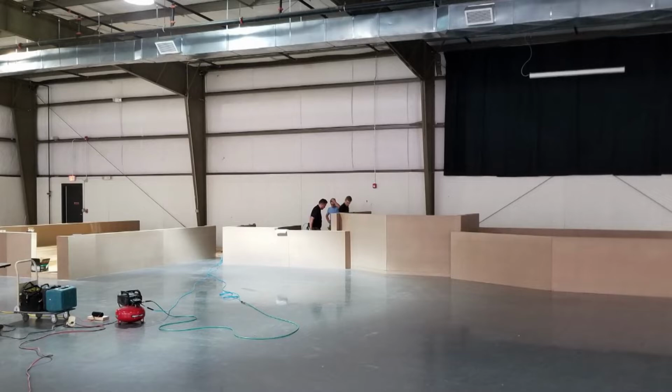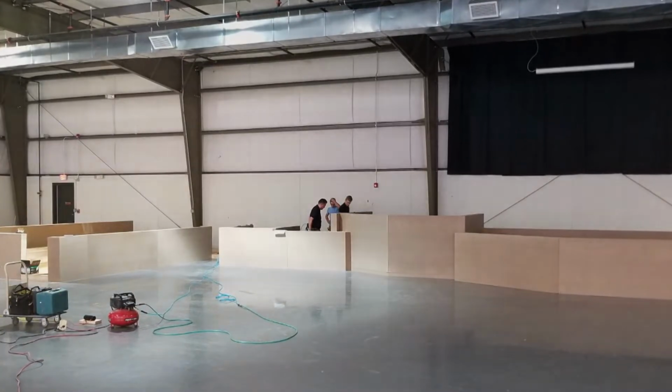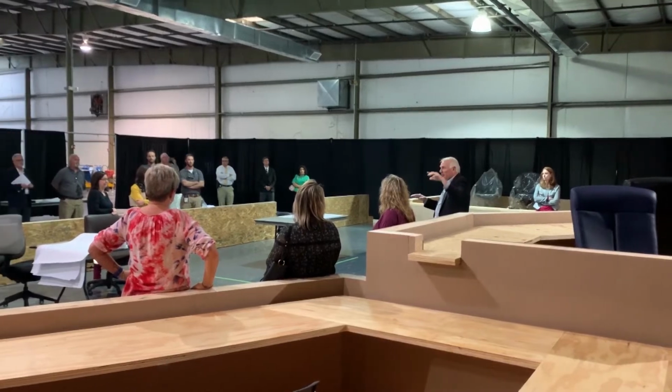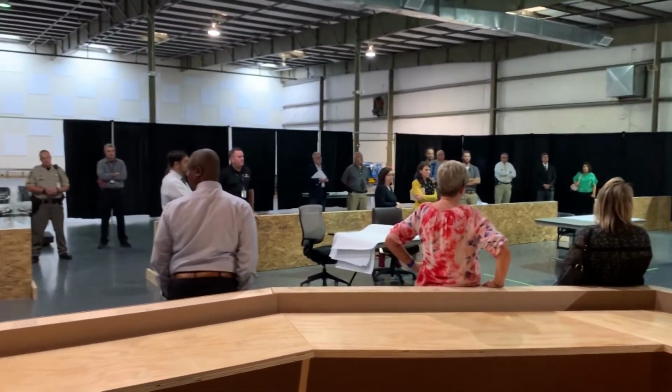As part of the schematic design process in review with the end users, Messer Construction was able to build out 2 mock courtrooms for us at our current Infrastructure and Asset Management Operations Center. It's a large warehouse, and we were able to build out 2 mock courtrooms that are completely built to the size that they will appear in the new building.